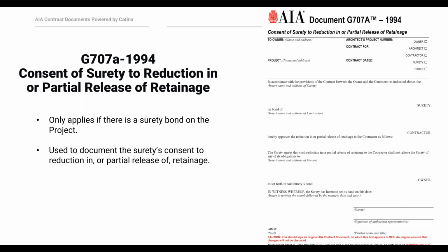When I was on the surety side and things went sideways on a project, I would have to try and analyze what went wrong: why are all these subs making lien claims on the project? That's exactly what I used in the past to try and figure out what payments went where and to whom. So I think that the payment application or schedule of values is really your best option.